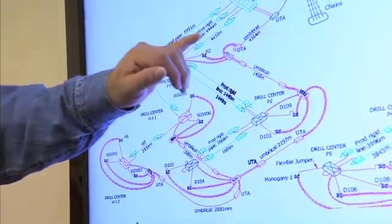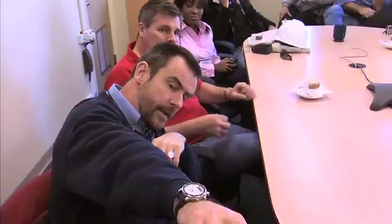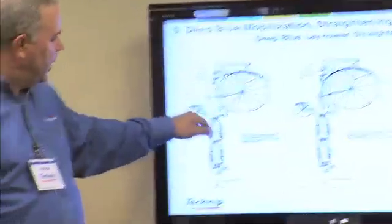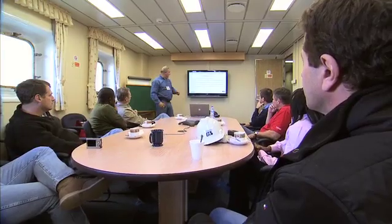One of the distinctive features of this project is that it's being led by a truly integrated team, including Tullow and its partners Anadarko and Cosmos. Vitally, this team remained small and nimble enough to make quick and innovative decisions, such as when key contractor Technip proposed splitting the fabrication of the flowline spooling between this site and another across the Atlantic at Dande in Angola.